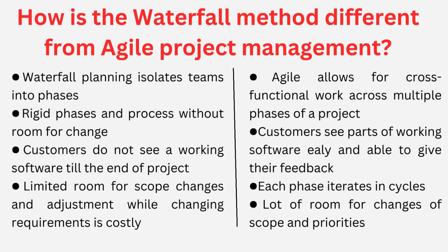Agile, on the other hand, allows lots of room for changes at the end of each iteration. Since requirements are not completely analyzed and since the whole system is not built in one go, customers can constantly review the working releases that they get after each iteration. They can give their feedback, they can request changes to scope or improvements to already built parts, and those scope changes can be accommodated at zero or low cost, if they are related to a part that is not already built.